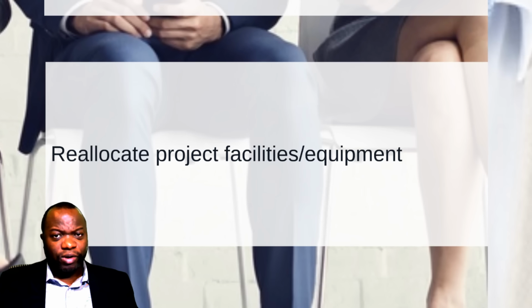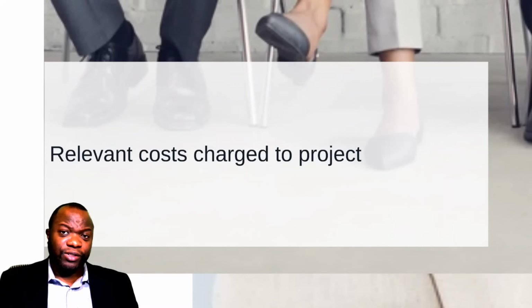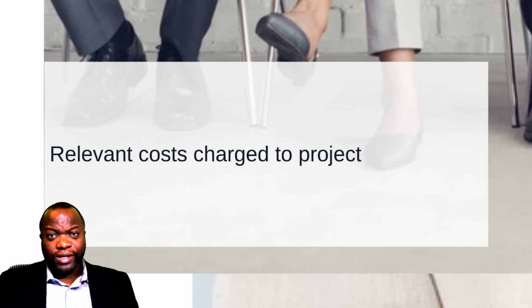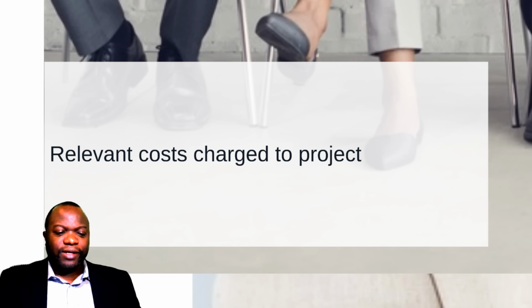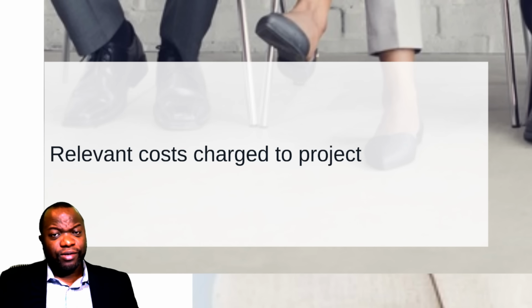Next, you want to reallocate project facilities and equipment, similar to what we just talked about. Because resources deal with human, equipment, materials, supplies, facilities. You want to make sure that anything that was not used is transitioned back into the organization or program or wherever it is. And then this one, relevant costs are charged to the project.